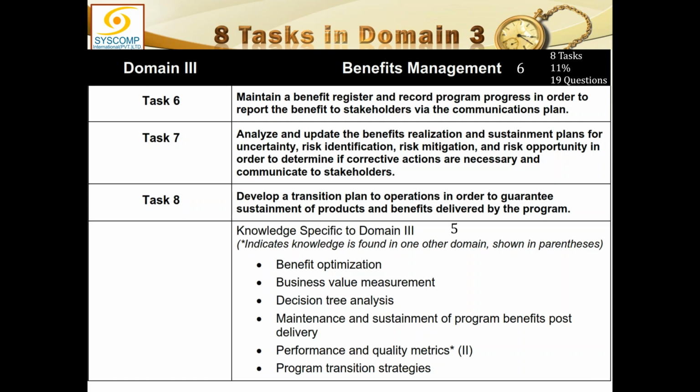What we've been doing is that the broad strokes, the general policies, procedures, and tools, are all in our project management plan. And then there is a section in which we do the individual tracking of each benefit. So I think we have a combined project benefit and benefits realization register in the same thing.